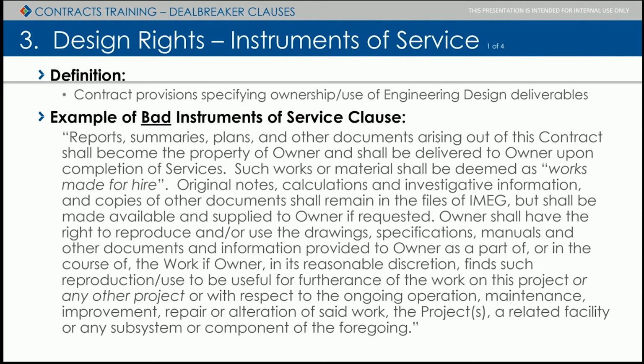And to summarize, the bad instruments of service clause is where we give ownership over to the client completely, and they get to do whatever they want with those designs. All right, even using those designs for another project that was not contemplated by the design. Something goes wrong because they've used plans that are very custom for one set of circumstances, but maybe they wanted to save money on design costs for a project that's very similar down the road, but it's not the same,